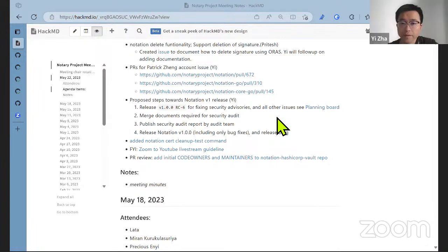Okay. However, I must say, if we realize that we want to hold the date and we want to punt on a few features that are not getting done by that time, I hope we are okay to make that decision as well. If there is something which is not getting done by June 10th, then it is not critical for 1.0.0, and we should be willing to move it out of 1.0.0 to hit the June 10th date.